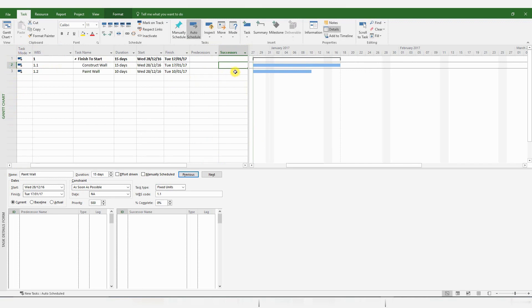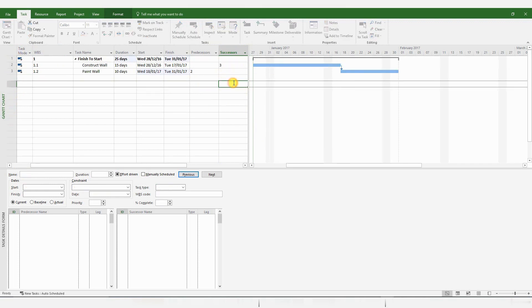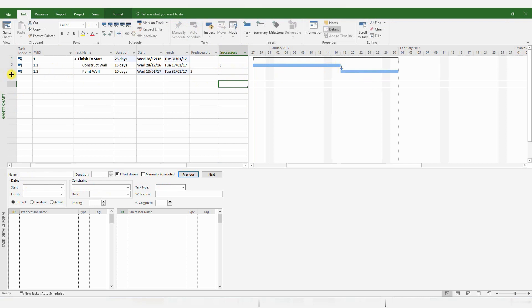And you could simply add a successor by using the Task ID from this section here. If I insert the number 3 here, MS Project automatically generates a Finish to Start relationship with Paint Wall, which has got a Task ID of 3. So that's a Finish to Start relationship.